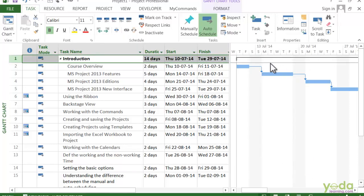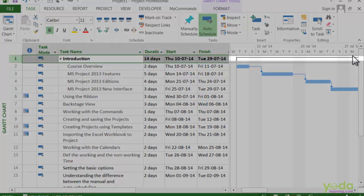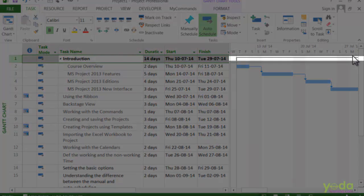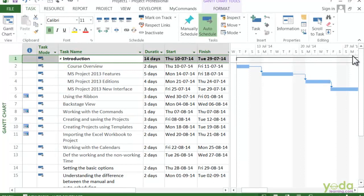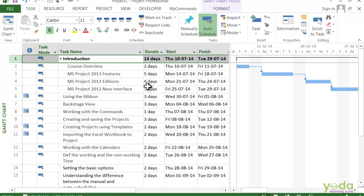That shows the duration of all these subtasks. That's one of the things about summary tasks - the duration of the summary task is the duration of the sequence of these subtasks. Just click the black triangle and the subtasks disappear. If you want them to reappear, just click on the white color bracket.